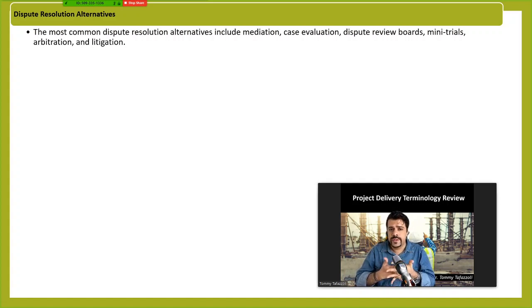Arbitration could be legally binding, depending on how you decide. It's an expensive resolution method, because most of the time you need to pay a firm a lot of money, as they will do a thorough investigation of all your expenses and the project incidents to find out why the problem has risen.